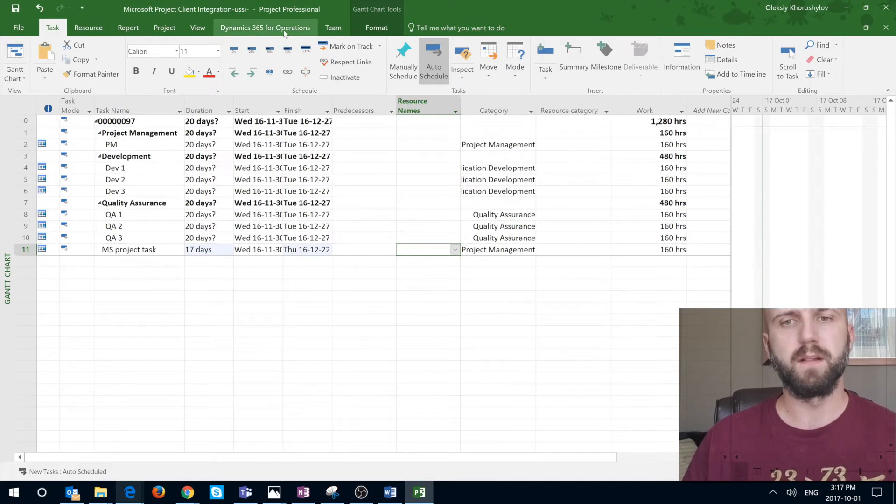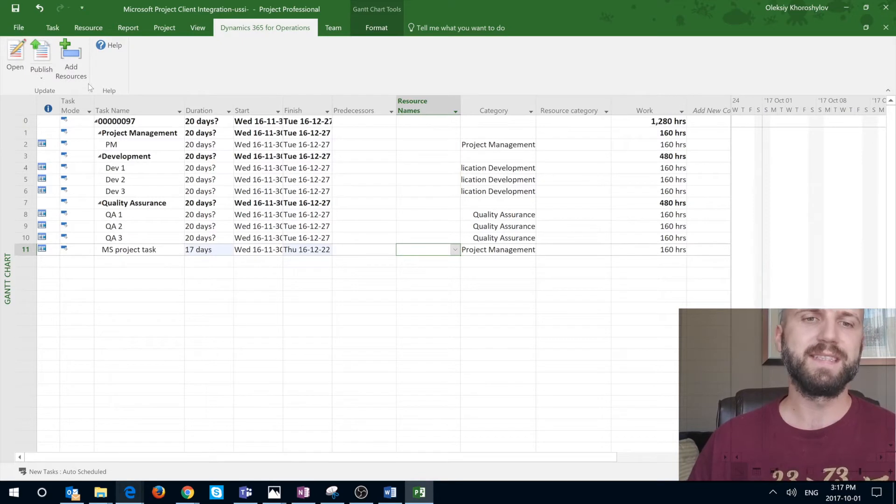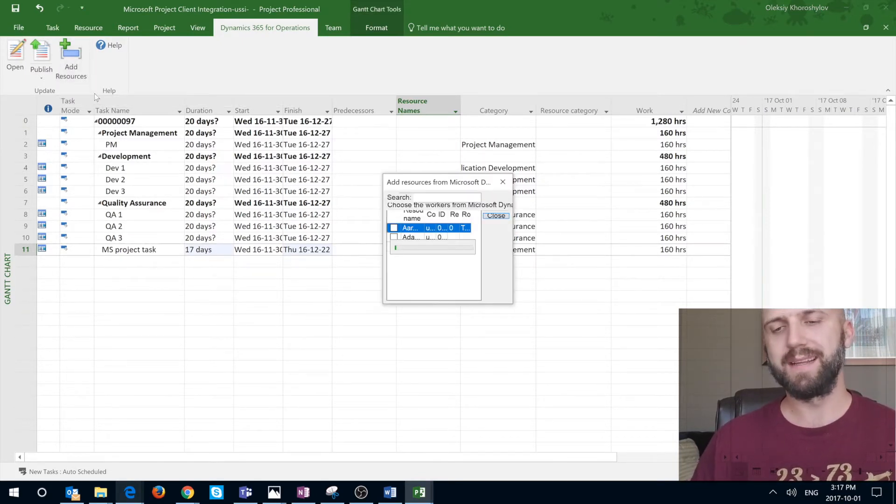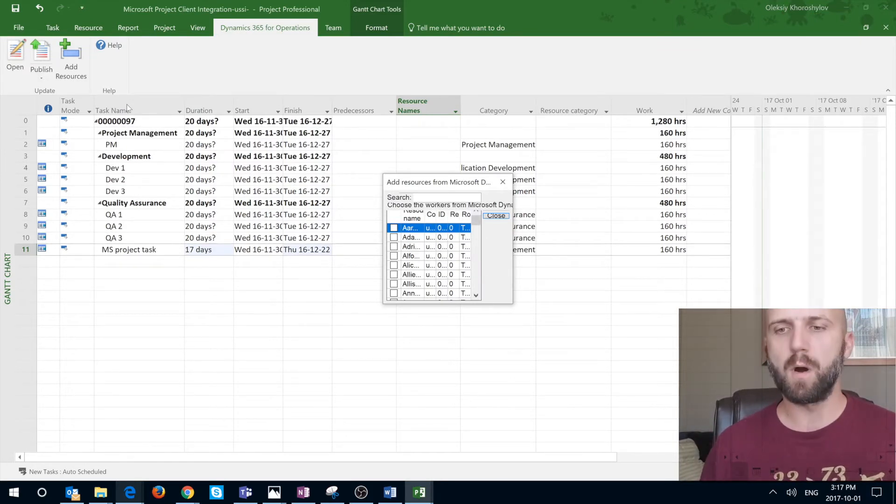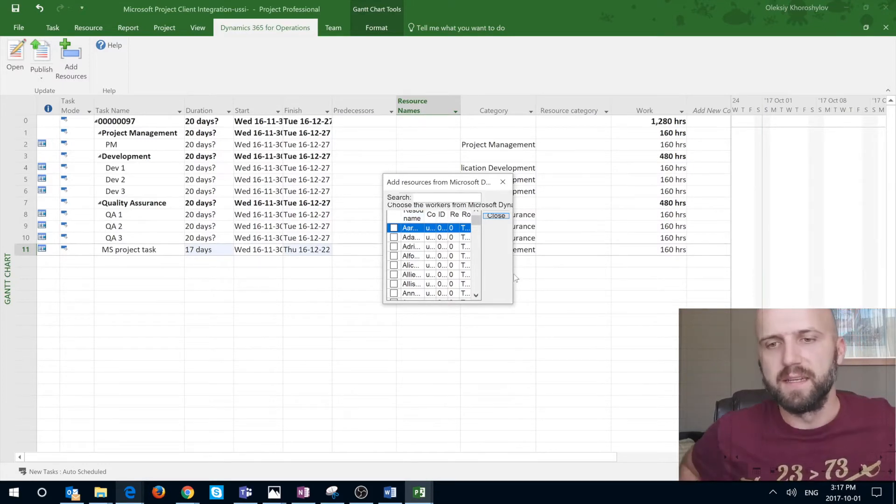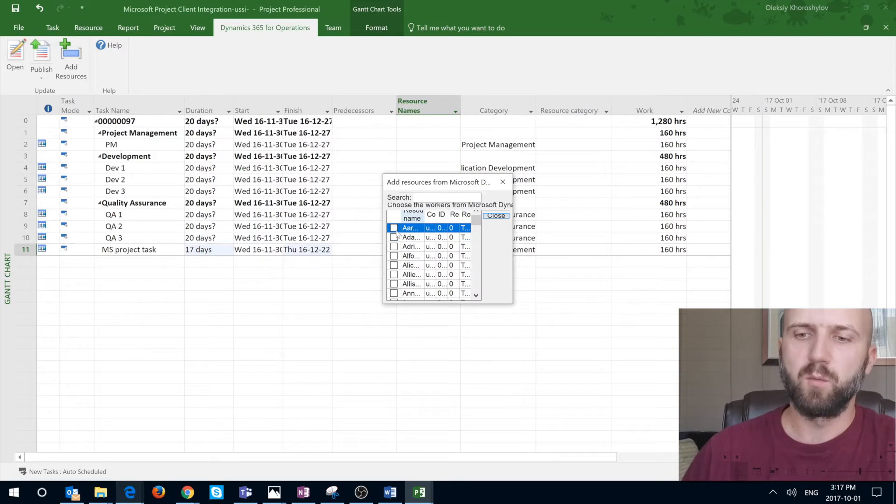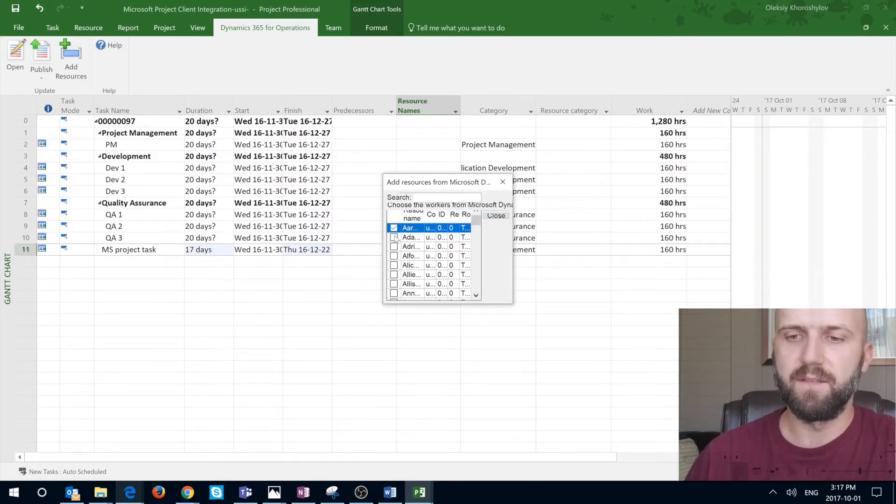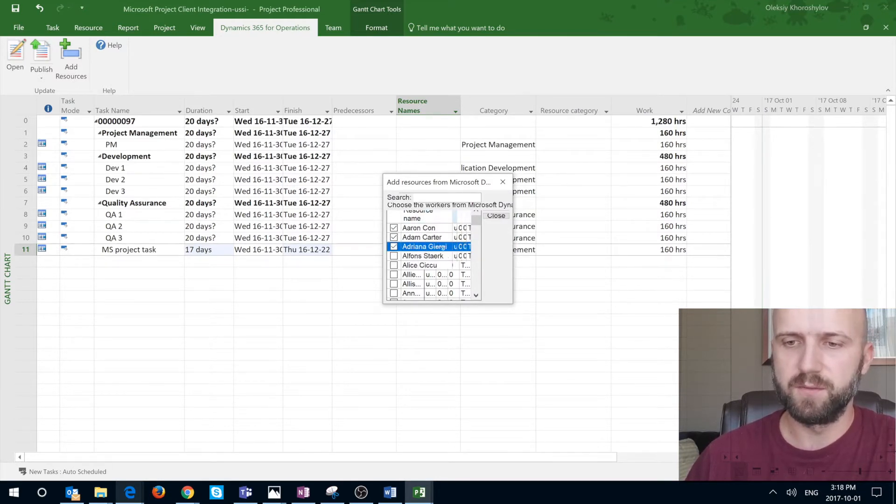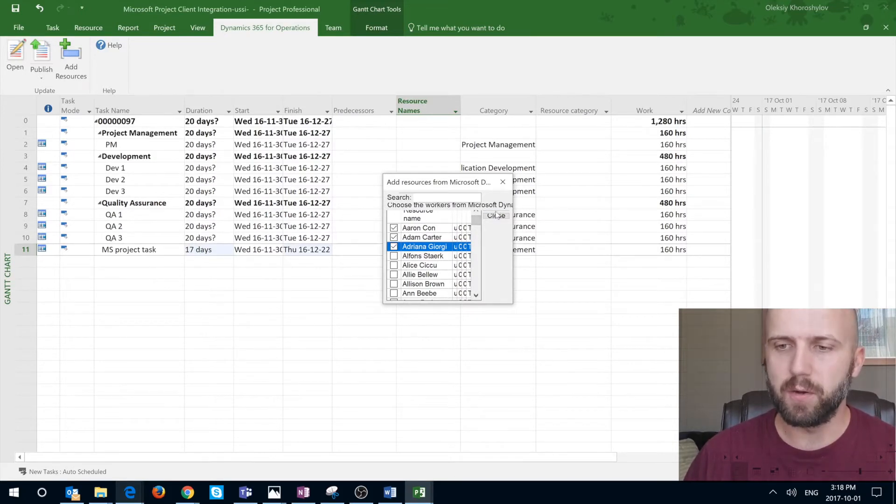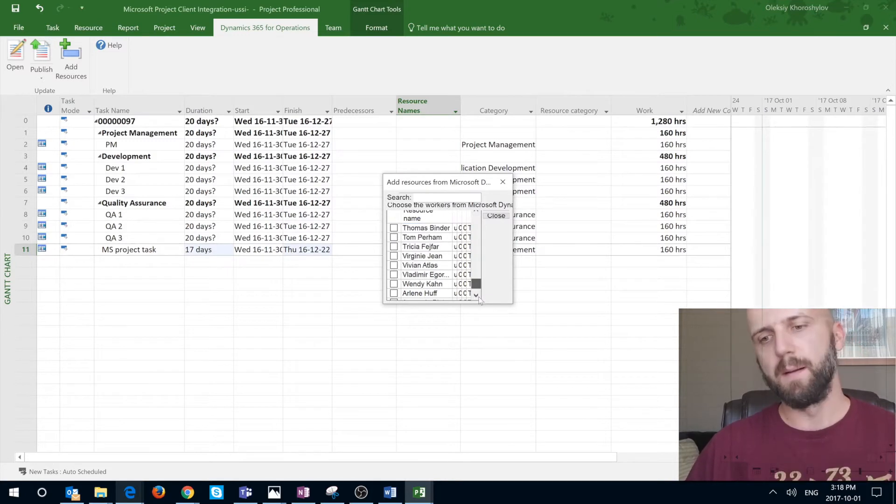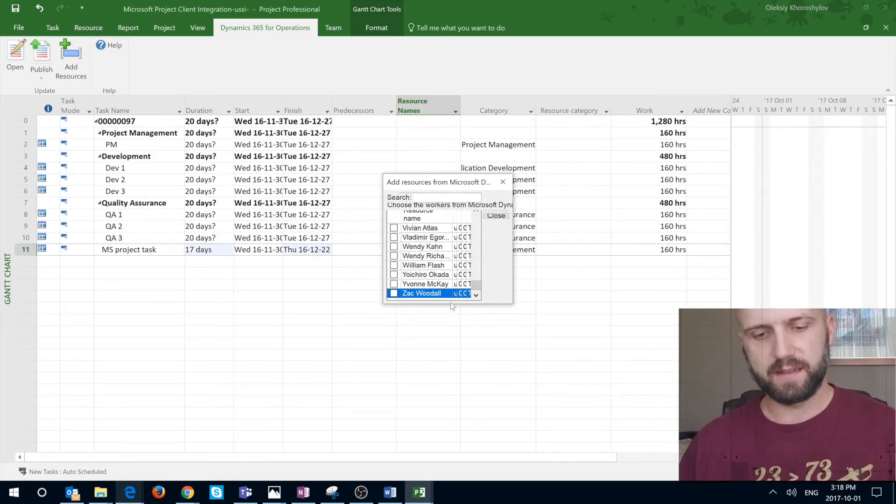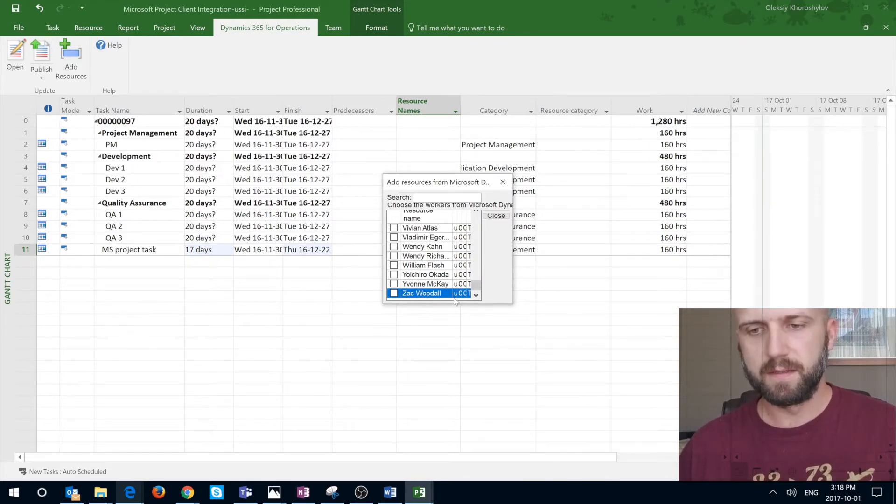The new features are available under this tab. I'm going to click on this Dynamics 365 operations tab and you can see that I can add resources to that task. I'm going to click on that and that's where again the window is too small. I cannot really resize it in any way. But what you're doing here is you can select available resources for this task. I'm going to select those first three names which are Aaron, Adam and Adriana. Unfortunately the OK button is hidden. You can only see the close button. So we have to kind of blindly get to it.